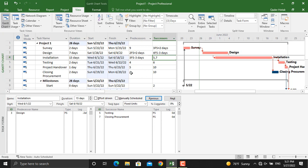To do that, we have two different methods. Number one, if you click on this activity, in here we can change the type to start to start.